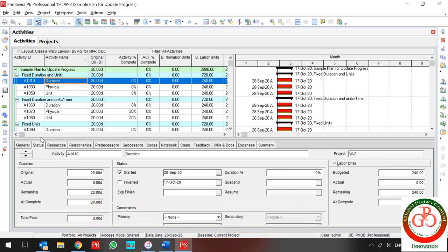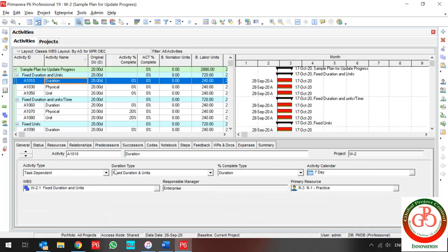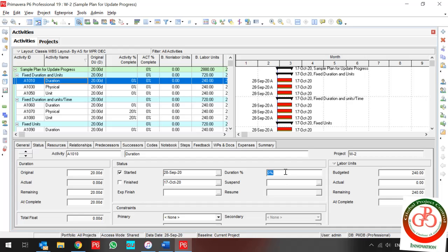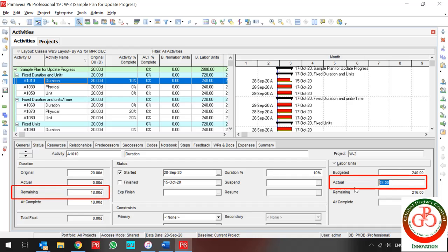The first activity is named Duration — it's the Fixed Duration and Unit type of duration type, and the percent complete type is Duration. If I check the Start button and I input a percent complete of 10%, you can find the labor unit is updated and the remaining duration is updated too.